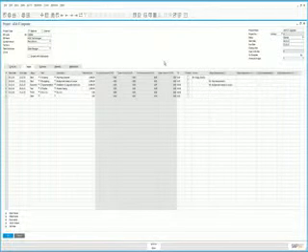Under the Stages tab, as you can see here, we've already started the project by defining a number of stages and tasks and their start and end dates. Currently, we're just finishing off the scoping and blueprinting phase. When working with a project, we can also assign a financial project to it. In this example, we've created a financial project called ADA, and this will be used on all documents generating journal entries and will give us additional reporting capabilities.